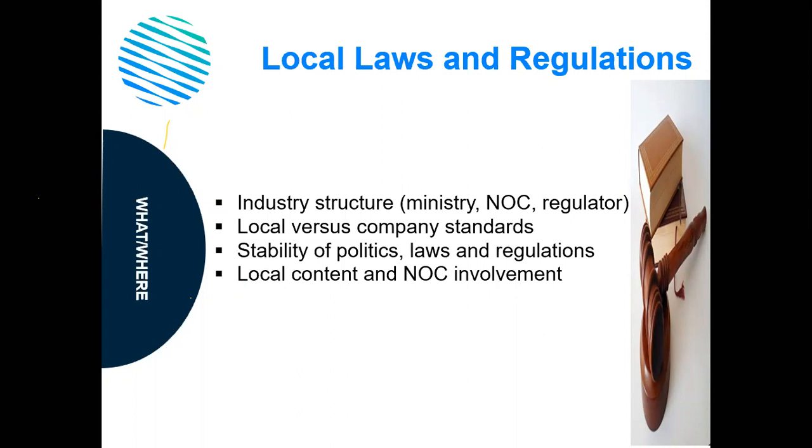And then one thing I did want to mention, which is very current and very important in many parts of the world, is this idea of local content, which I know many of you have run into before. But the idea that a chunk of the project is carried out locally. And of course, the national oil company is often involved in these initiatives. So what requirements does your company have under the contract that you have, or under law, to use local suppliers, for example, or local equipment or local labor?